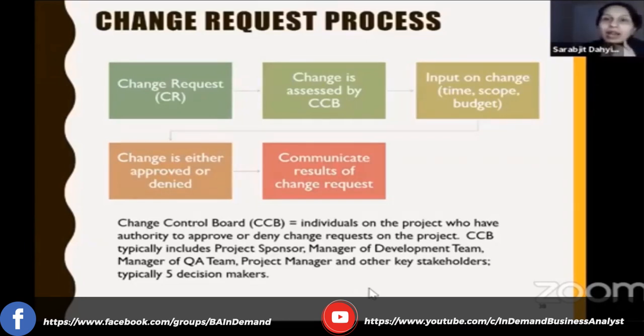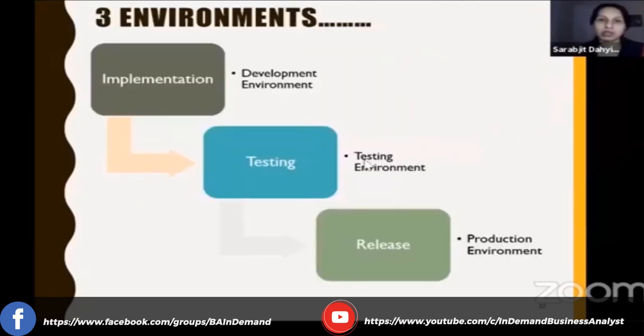Then we need to go back and assess the impact of that change, because any change that comes in after the requirements have been finalized, right? Let's say requirements are finalized and coding hasn't started, then there may not be that big of an impact, right? But there will be an impact, but probably not as big of an impact as if you discovered that change later on in the process, as I was talking about earlier.